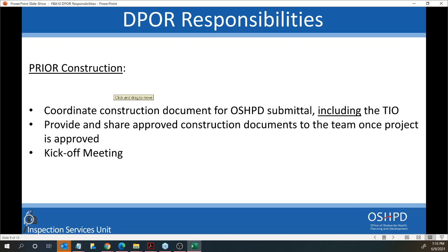And there's a lot of work that happens after plan review that goes beyond what the plan review staff is looking at. That has to do with identifying special inspectors, the approved agencies, the inspector of record. It goes into identifying a whole lot of information like milestones and sample reports and so on and so forth. So don't underestimate the importance of a fully developed TIO, and echoing what Monica already mentioned about the outstanding items list, the OIL list: the sooner you jump on that and start knocking those things down, the better your closeout process is going to look when you're ready to be done with this project.